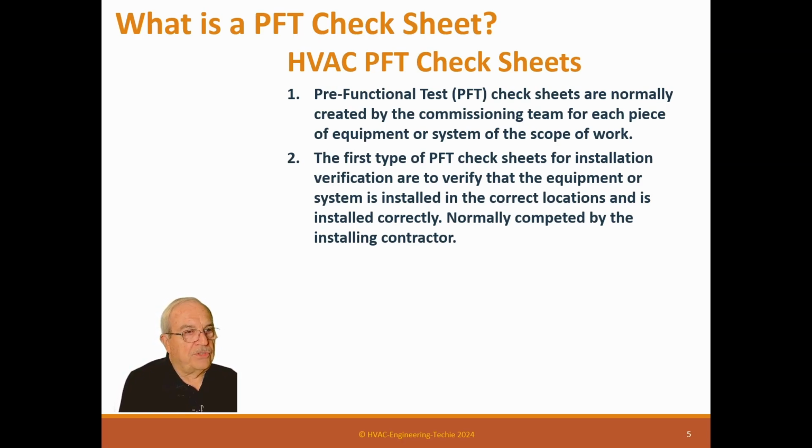Some commissioners actually don't do any of this. They have the contractor create the check sheets and go out and check it in the field. And in philosophy, if the control contractor's number one ambition was the quality of the install and the functionality of the system, that would actually work, but it doesn't happen that way. Remember that the contractors have other priorities, and that is profit and meeting the schedule. Those two are huge.